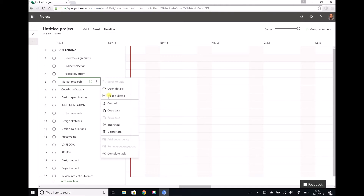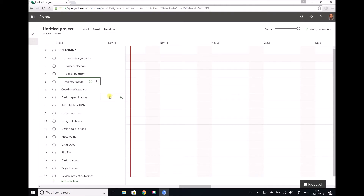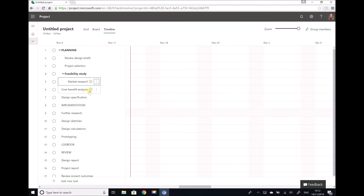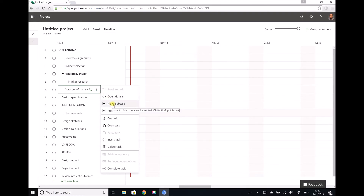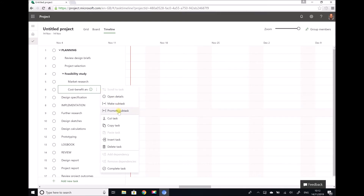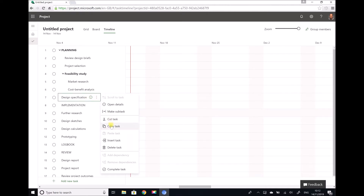We're going to do this for all of the tasks underneath and we see that it updates accordingly. Now if you recall, our market research was actually a subtask of our feasibility study, so we need to indent that further by selecting make subtask. In addition, our cost benefit analysis was also a subtask of the feasibility study, so we need to make subtask and indent again. Once a task is indented there is also the option to promote the subtask, which is the same as outdenting that task — it moves it under the preceding category. Next we have our design specification which is also a subtask.